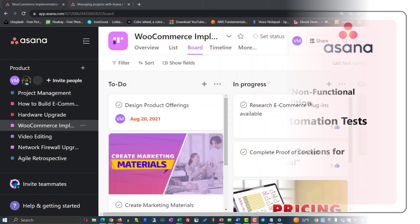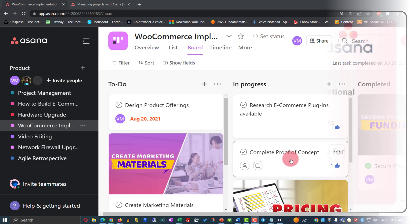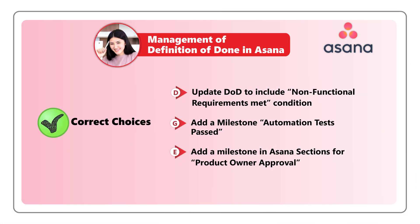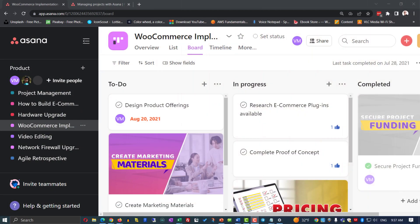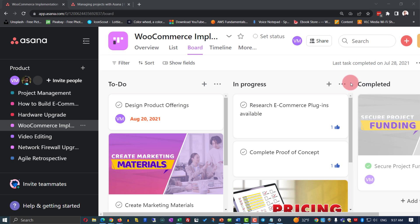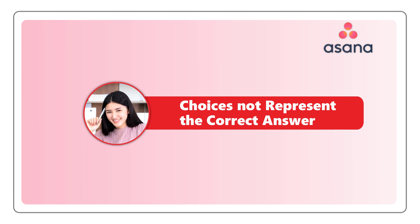For example, we are looking at a WooCommerce implementation project in Asana. It has three sections: to do, in progress, and completed, in relevance to the tasks that the team completes on the project. What choice E suggests — to add a milestone in a section for product owner approval — would require us to add a new section between 'in progress' and 'completed,' allowing the product owner to approve items before they are marked completed.